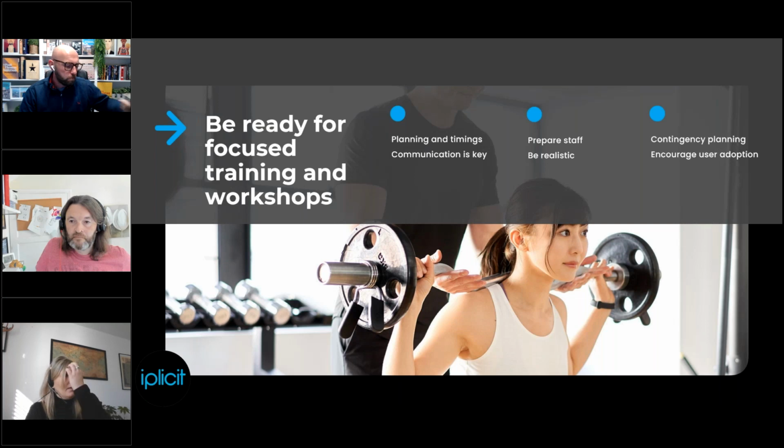We find that training on customers' data is also the best way forward. We're not training on any demo data. So there's an initial data migration of static records, and then we encourage the users to be processing transactions in that initial environment so that they're testing it, they're breaking it. We're working with them to tweak things along the way for different scenarios.